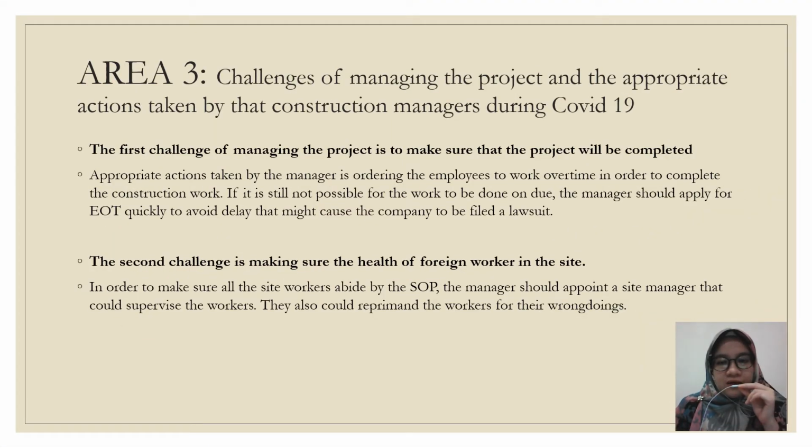The fourth and the last question is the challenges of managing the project and the appropriate actions that should be taken by the construction managers during COVID-19. The first challenge of managing the project is to make sure that the project will be completed. Since there is the MCO, no construction work is allowed, hence it will take more time to complete the work. The appropriate action that should be taken by the manager is applying for EOT quickly to avoid delay that might cause the company to file a lawsuit.